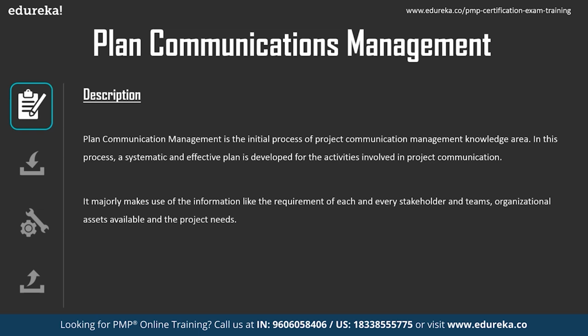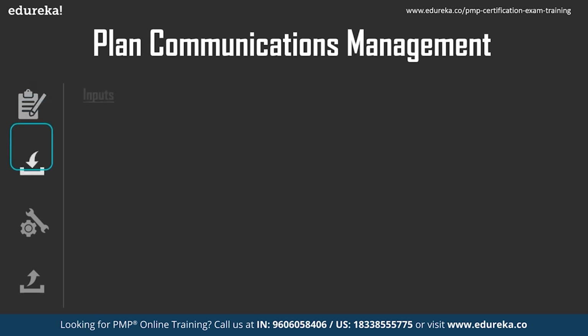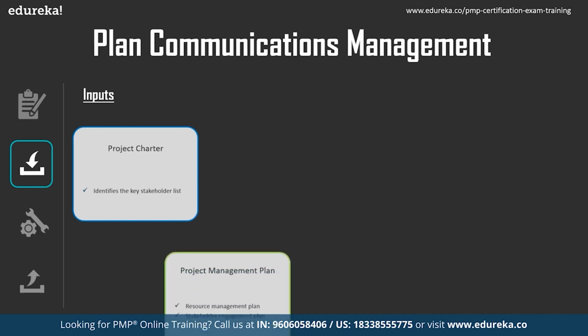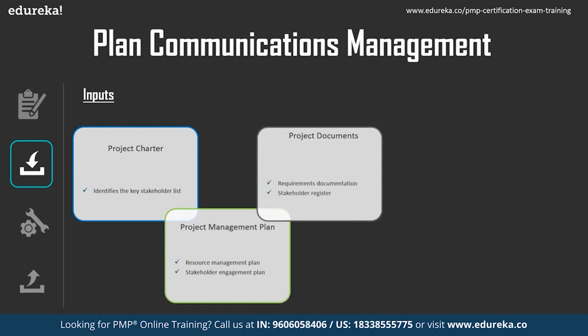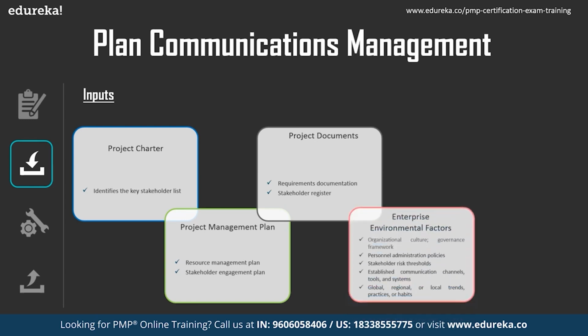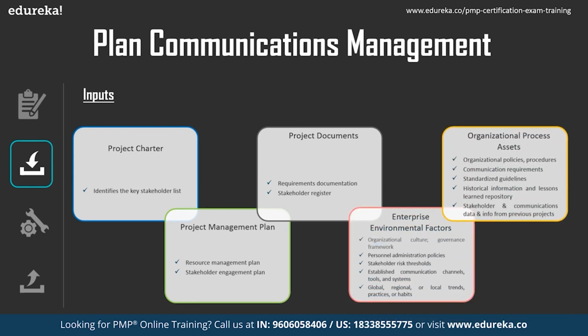So creation of templates can also be done so that the more frequent communications like weekly updates, monthly updates, fortnightly updates can have specific templates for the specific set of stakeholders. So inputs to plan communication management include project charter, project management plan, which includes resource management plan and stakeholder engagement plan, project documents like requirements documentation and stakeholder register, enterprise environmental factors, and organizational process assets.